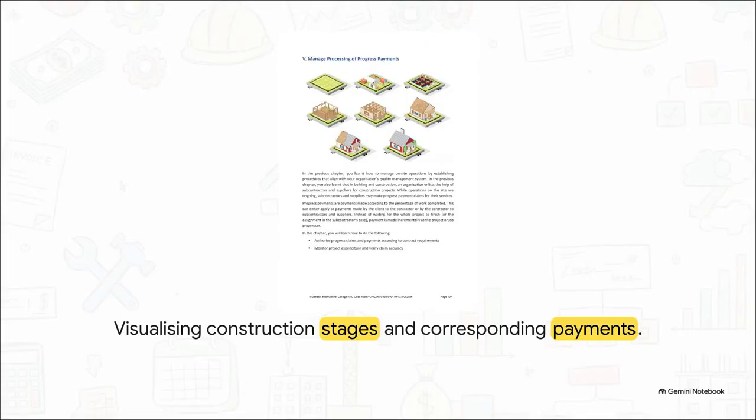Visualizing this progression is super helpful because it shows exactly how we anchored these abstract payments to very tangible real-world milestones. Take that lockup stage, for example. You're not just paying a random invoice, right? You're paying because the external doors and windows are literally secured. The site is physically protected from the elements. So the physical progress completely dictates the financial progress.